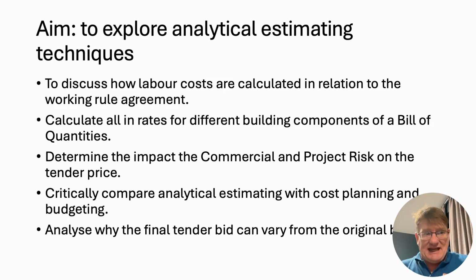Now, analytical estimating techniques, compared to the elemental cost plan or the build-up of an elemental unit rate, an EUR, for instance, are based on much more accurate, up-to-date data.